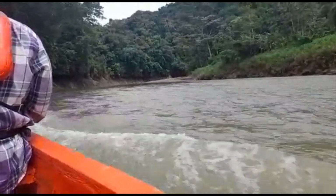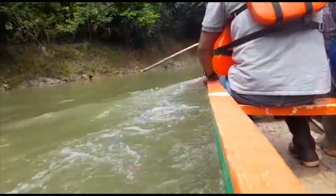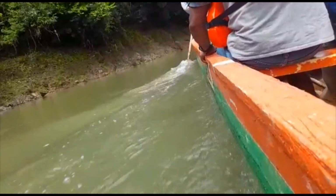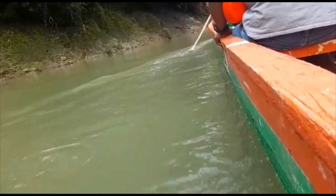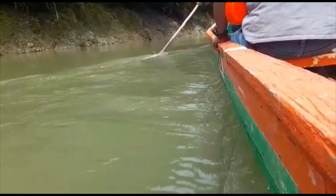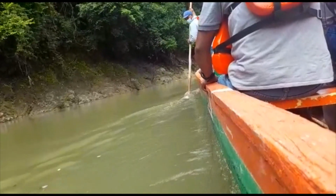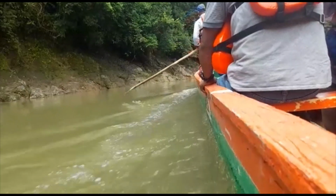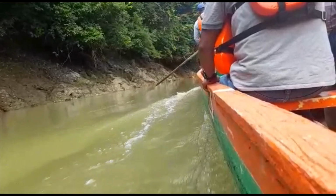It will be a challenge to bring potable water to this community. It was evident in the travel to the site, which took close to 1.5 hours by dugout canoe. This is very difficult logistically during the construction, and this will need to be reflected in the cost estimate as well as in the material requirements.